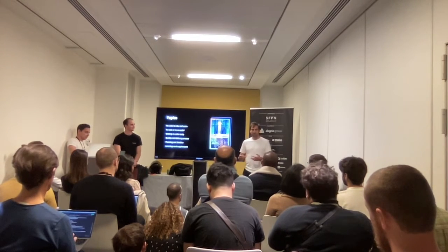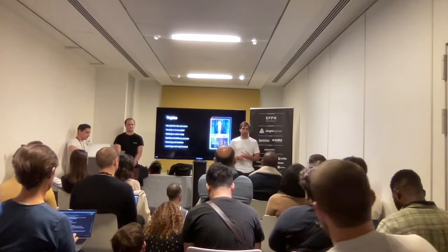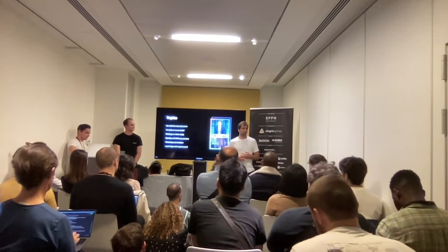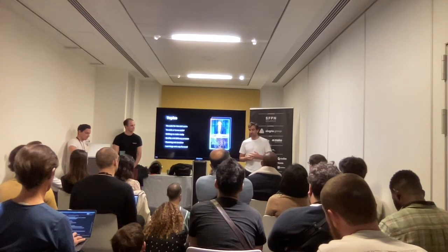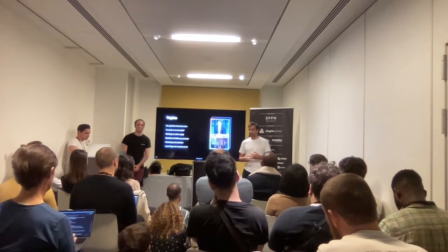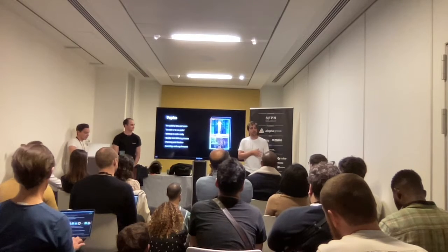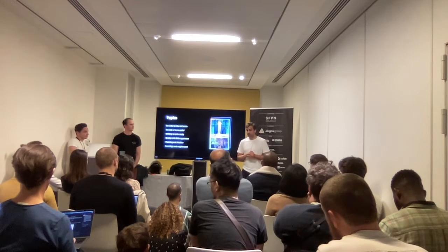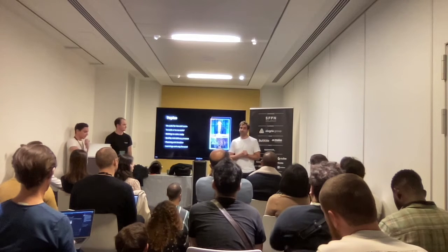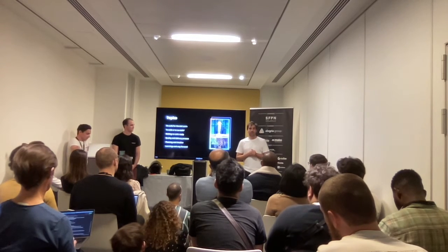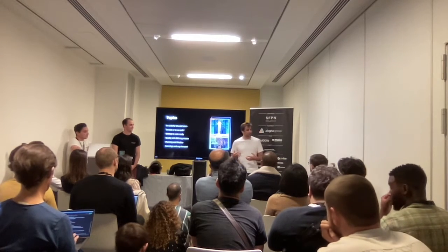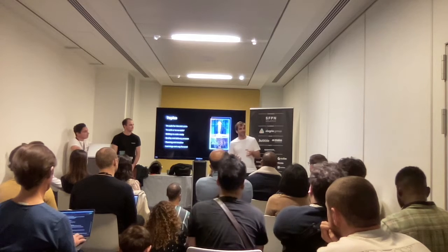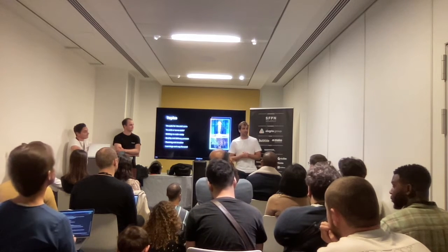A team of developers is between 3 to 4 backend, 2 to 3 frontend, and for this Slack integration, we actually spent 3 months with the tech team. Before that we had the discovery with the project manager, so it's a bit more than that in terms of cost. And yeah, we were not happy with the scope at the end, because the more we were advancing, the more the cost was increasing.